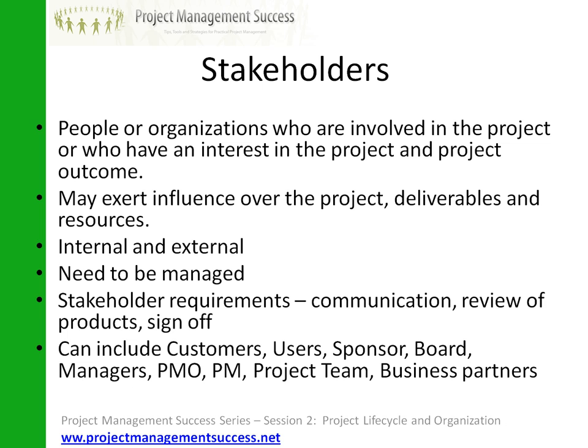They are considered stakeholders of the project. And we do stakeholder evaluation up front of the project because stakeholders need to be managed. You need to communicate with them and you need to often review products. It needs to go through some of these stakeholders, and sign-off needs to be achieved through these stakeholders. So you do need to put some time into thinking about how you're going to manage stakeholders, who you need to communicate with, what information they need to know and when they need to be involved in the project. And that's really important.